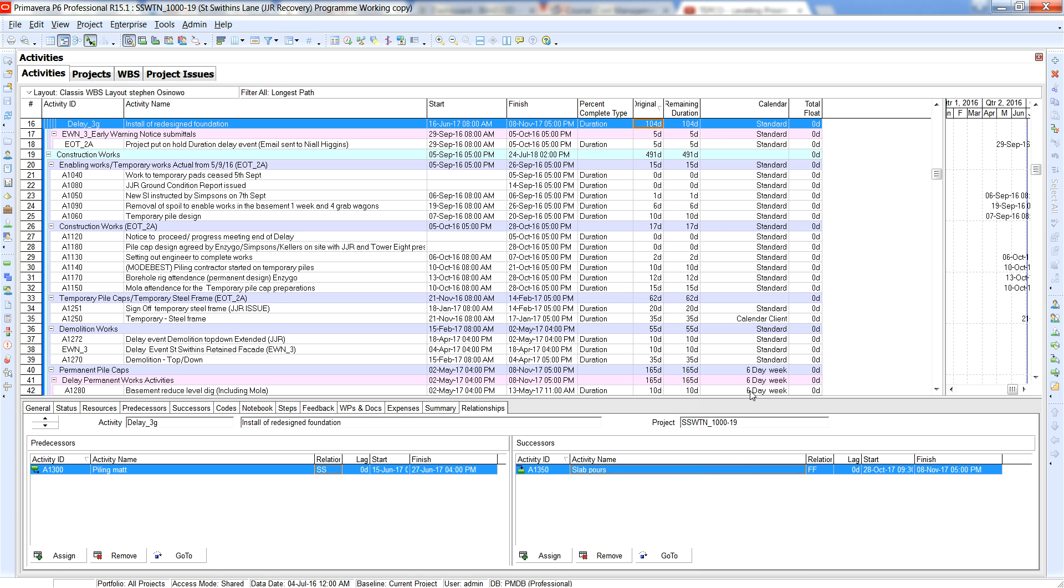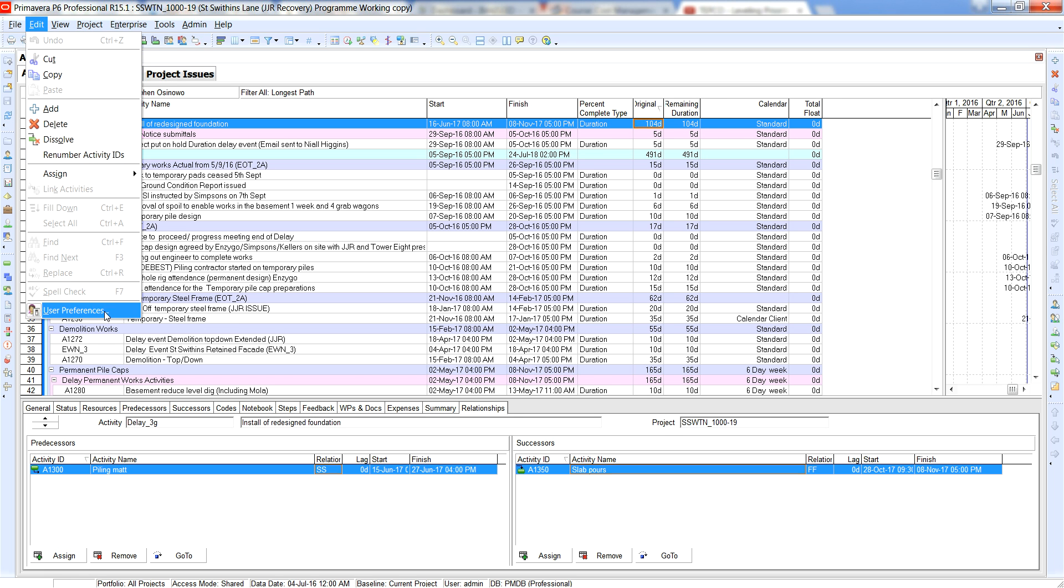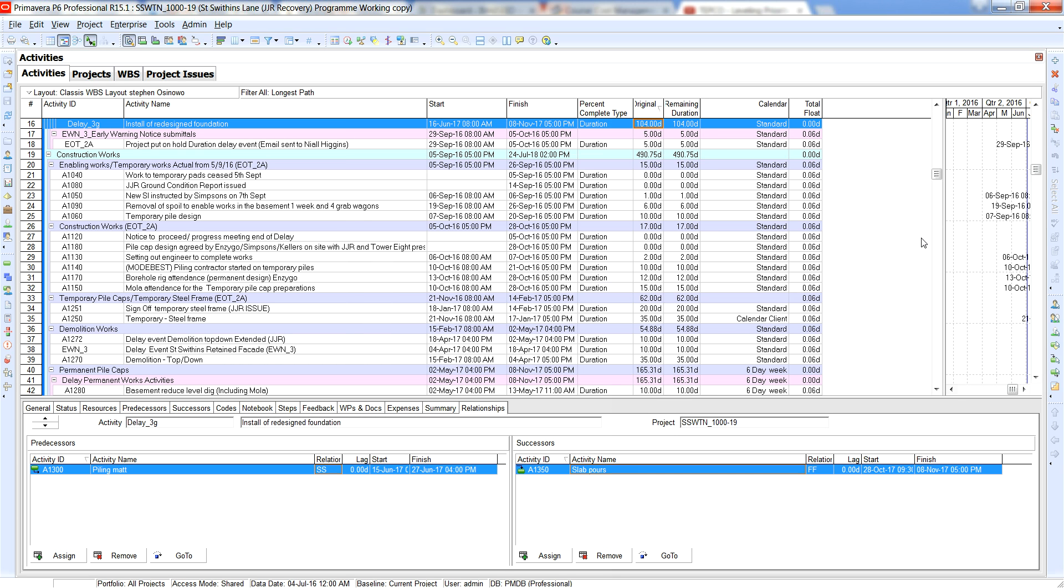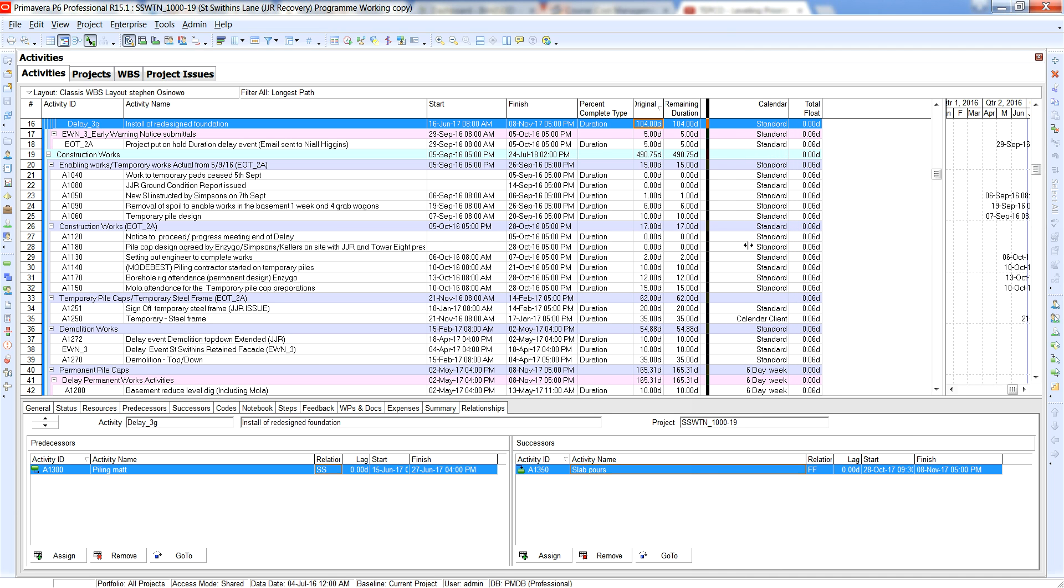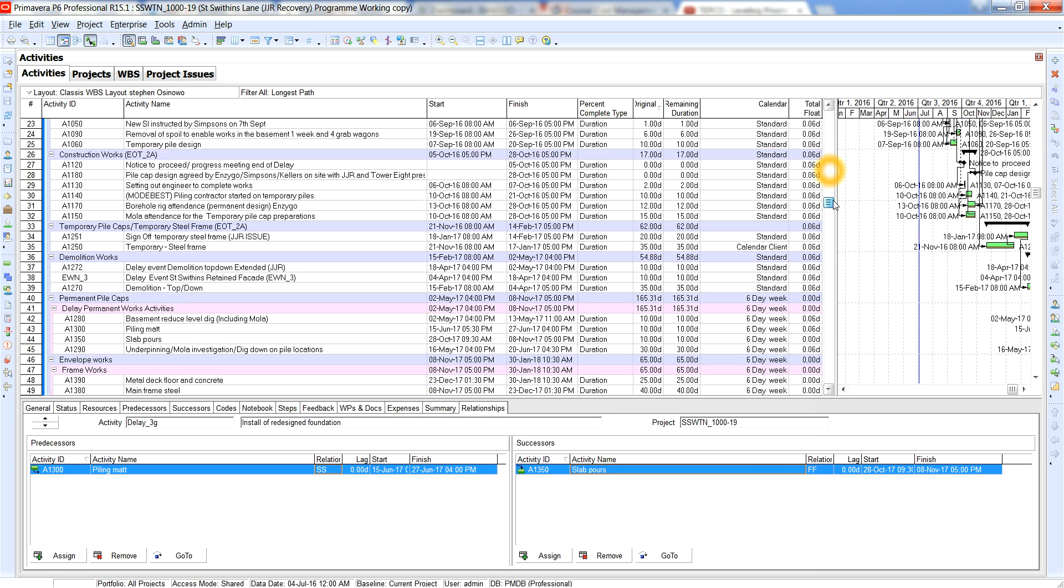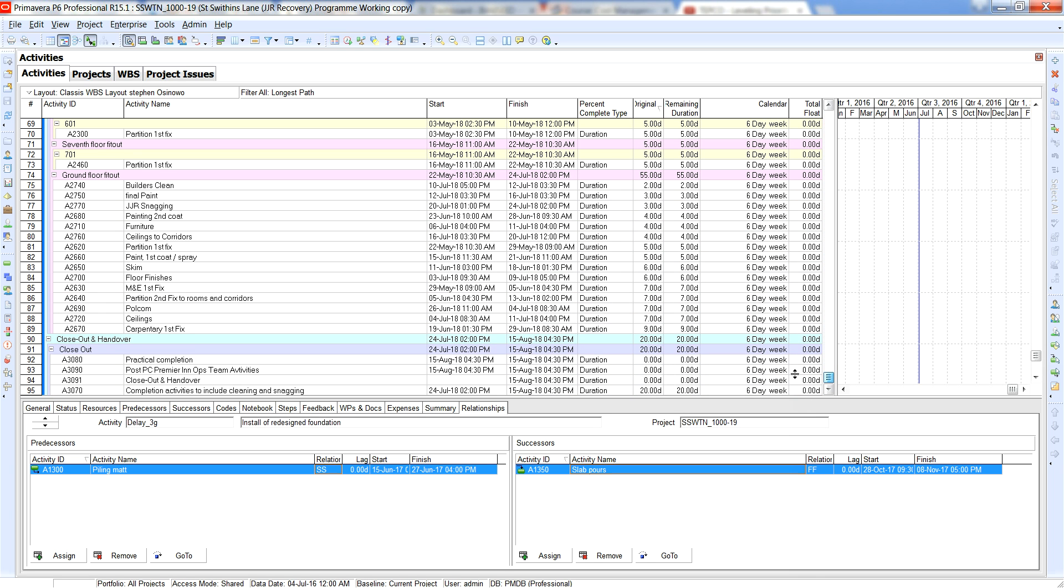So we'll go back and get it back to the decimal places, and that in essence has already explained to us that there is something going on with the dates. So that's step number one with our total float value. Already we can see that for these activities you have differing start times, different finish times as well. We've got a finish day of 4:30 and it starts at 2 p.m.